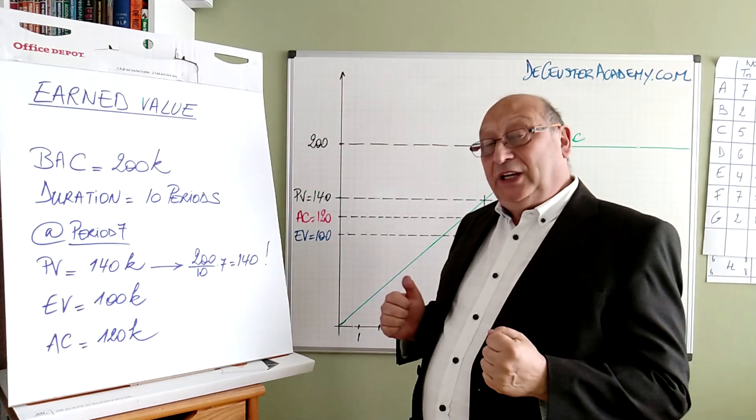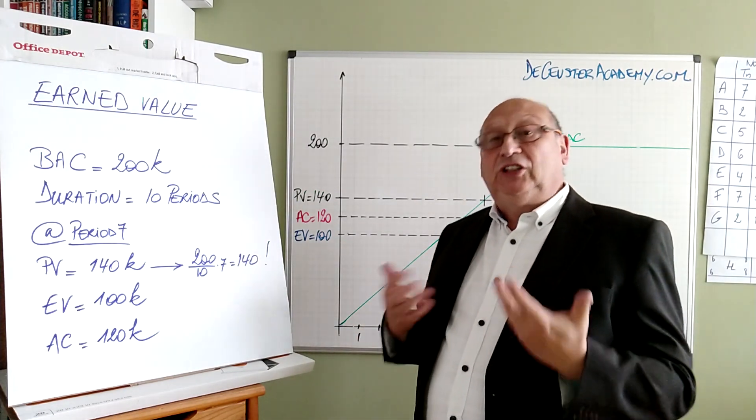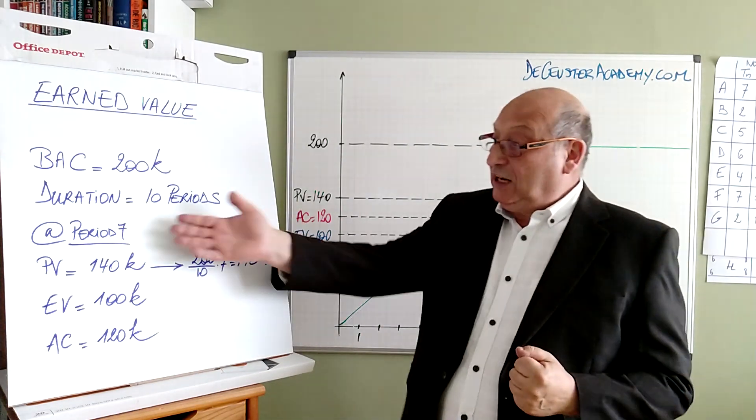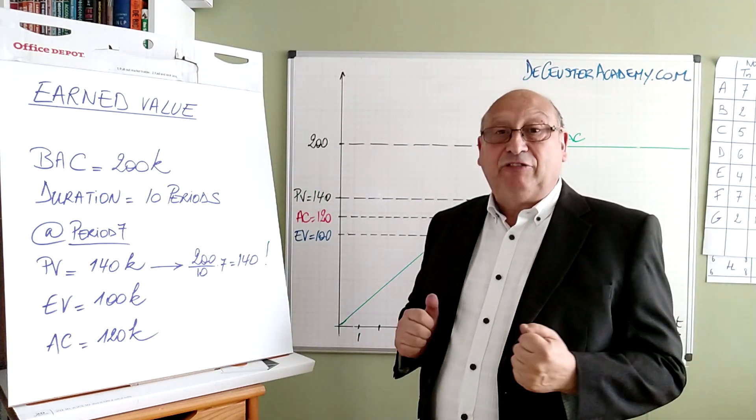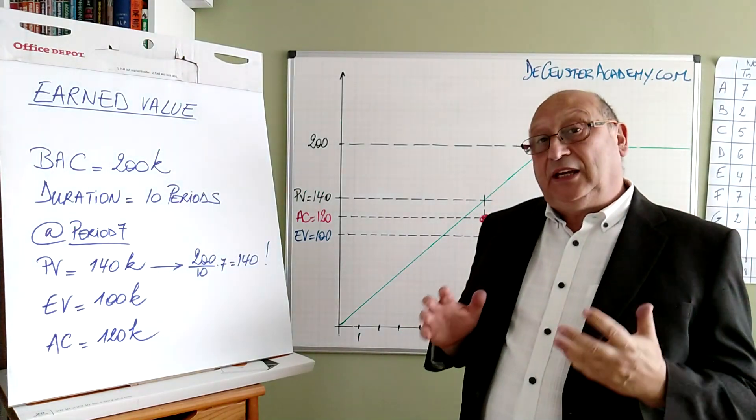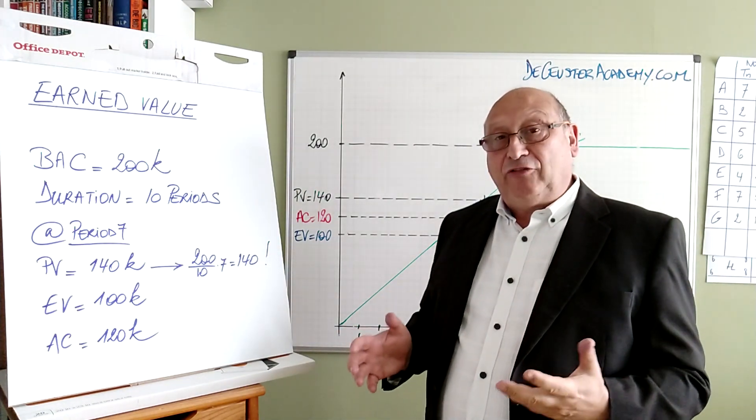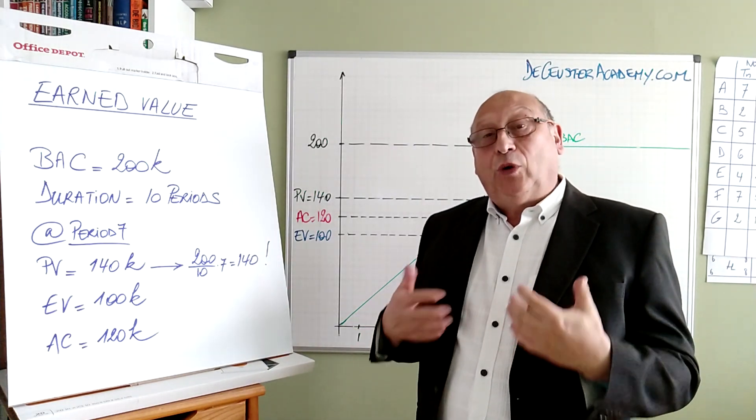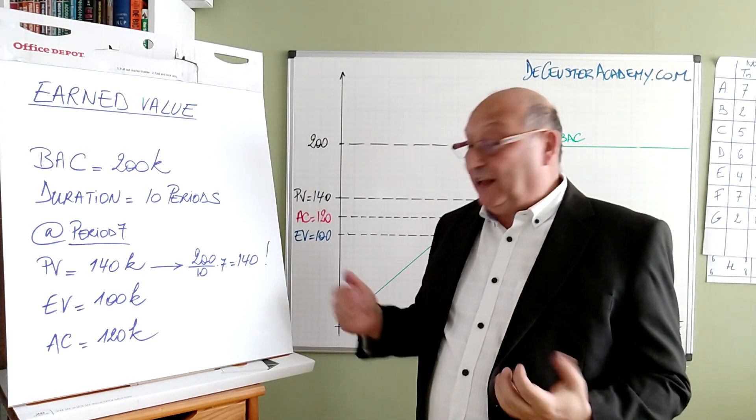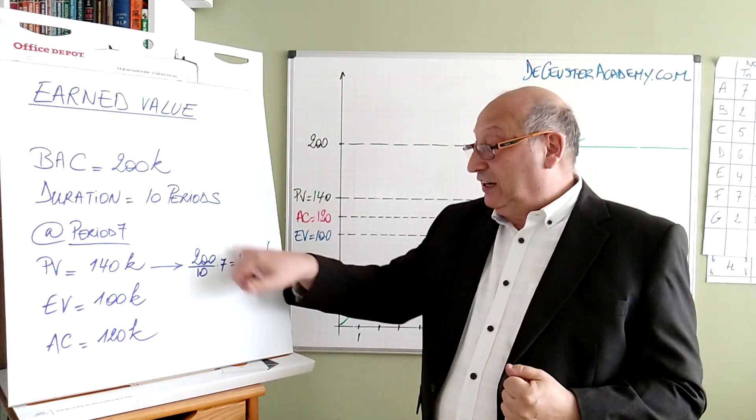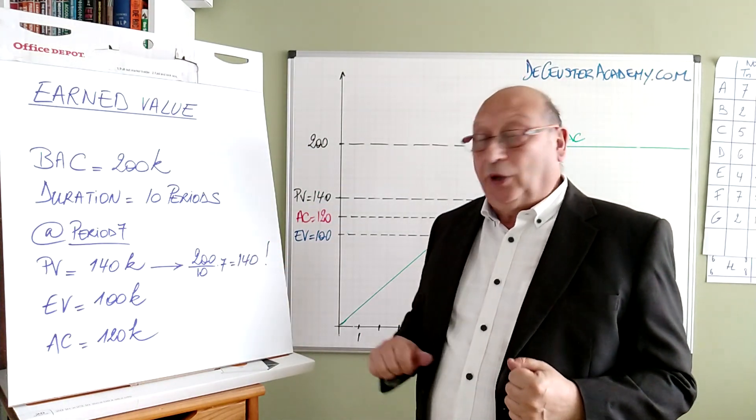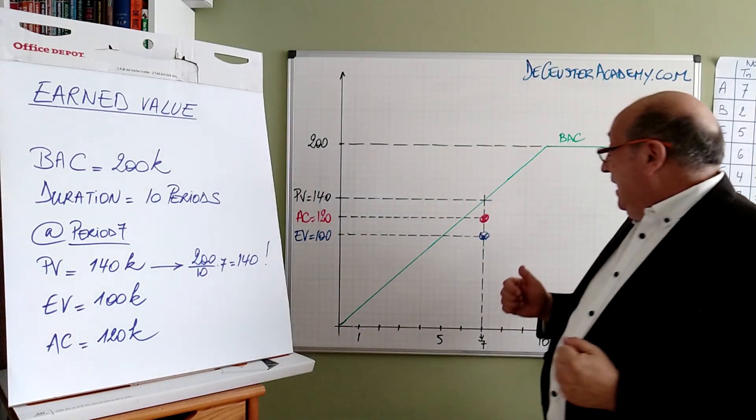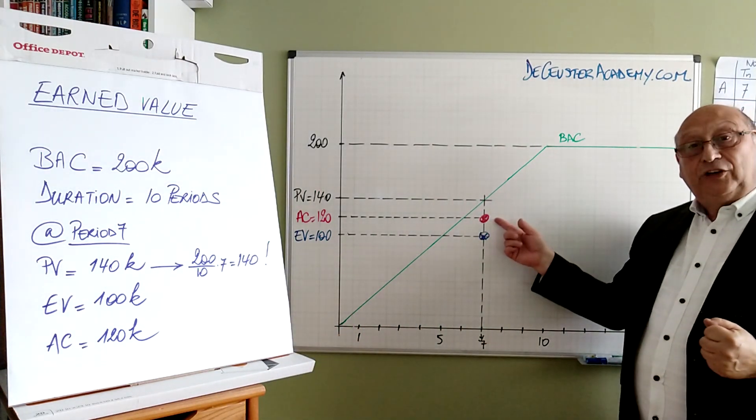Based on this we look at the situation at a certain moment. Here we look at period 7. At period 7 we expected to have a planned value of 140k. That's what we expected to spend. We can calculate that linearly, rule of 3: 200 divided by 10 times 7 is 140. And I see that point here on the graph.